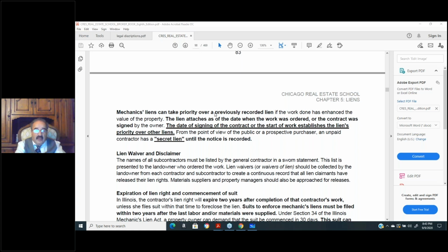Well, if all the work was done by the owners and they didn't pull a permit, that could be a real big problem. And what you could do at that point, and make sure you mention it to the lawyer, is that the lawyer could hold some money aside at the closing to get this permit, to cover any cost or anything else. So that's what you do.